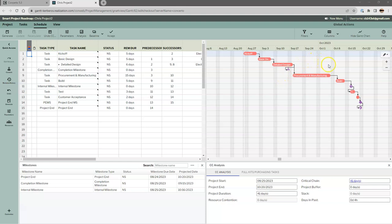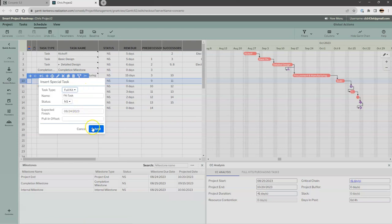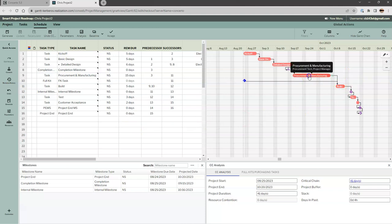I want to have a focusing full kit point that I can start to monitor well before I get to build — a few weeks before. I want to identify all those parts, since we've gone through detailed design and they're all in procurement. I'm getting ECDs back from manufacturers or part suppliers, and I want to make sure I have all those items back before I start to build. We call that full kit, or preparation for the build phase.